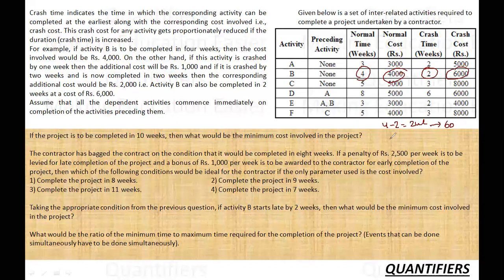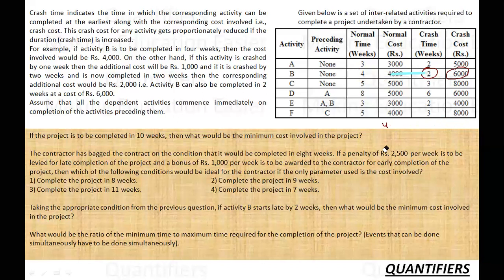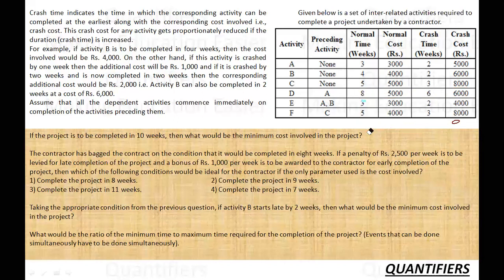The transition cost for B is 1,000 per week — so 1 week extra costs 1,000, 2 weeks extra costs 2,000. For D, which normally takes 8 weeks and in crash time takes 6 weeks, the difference is 2 weeks and the crash cost increases from 5,000 to 6,000 — that's 1,000 rupees over 2 weeks. So D has a transition cost of 500 per week.